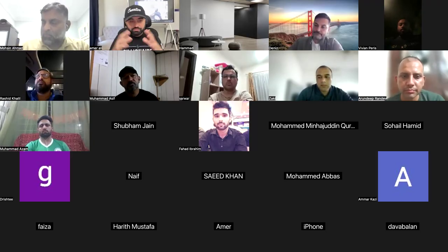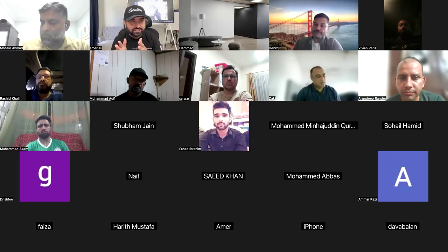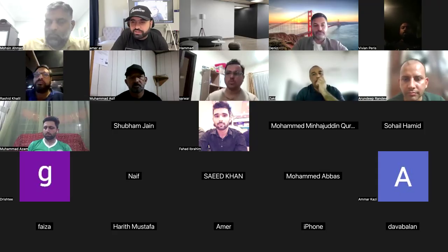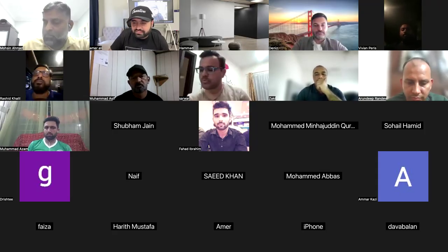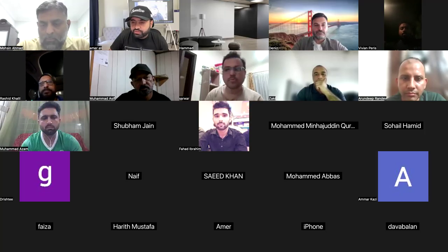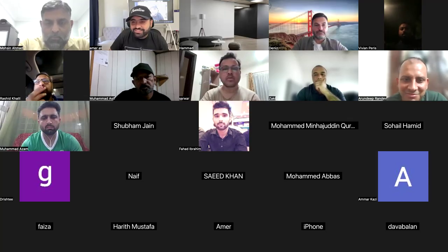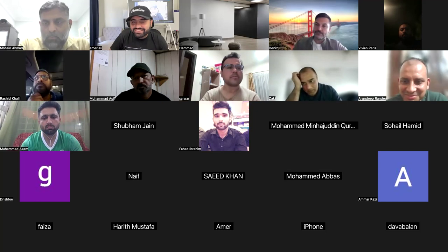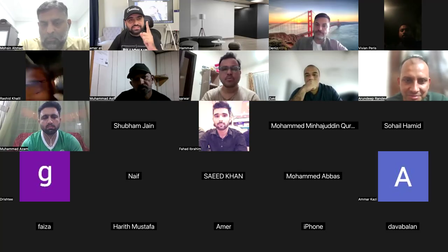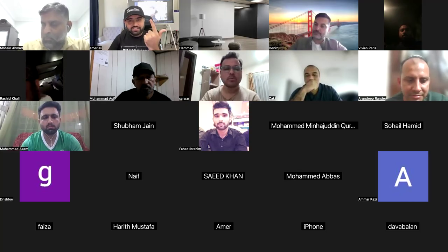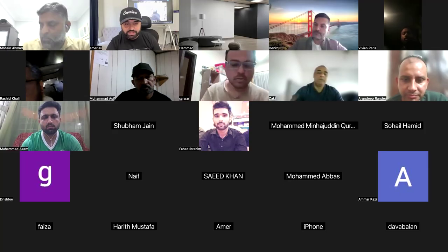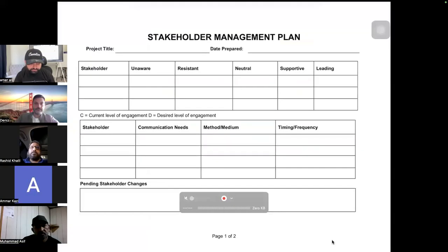Good to have you, Server. Planning will have, of course, all the things there. So which is the first plan we make? Any guesses here? Deva is saying stakeholder engagement plan. Anyone else? Arundeep, the project management plan is made in the end. Drishti, it's made in the end, because it's a combination of all the plans. Now, how can you get it approved? The stakeholder engagement plan is the first thing. You identify the stakeholders, you make the stakeholder register, and now you make a stakeholder engagement plan. So let's go with the stakeholder engagement plan.